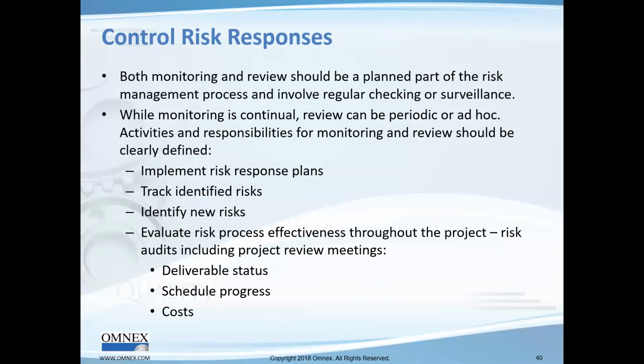So risk control responses, both monitoring and review, should be planned as part of the risk management process. We need to provide the feedback to management. We need to have them take a look at it. While monitoring is continual, review can be periodic or ad hoc, depending upon the risk level you're dealing with. So the responsibilities for this need to be clearly defined.